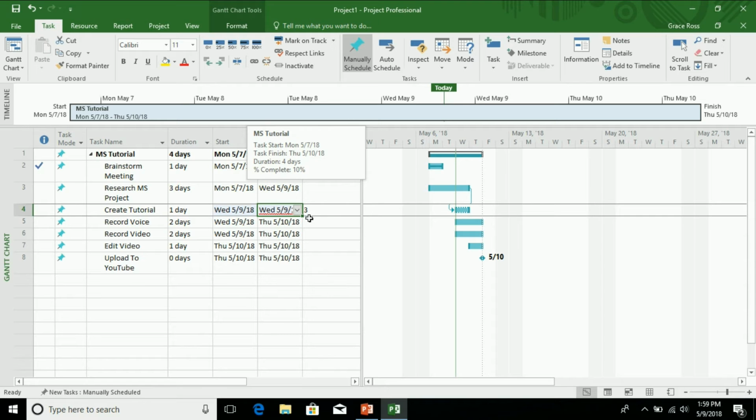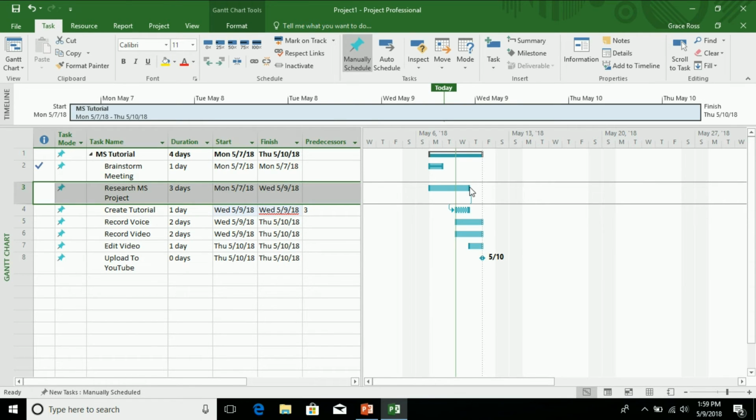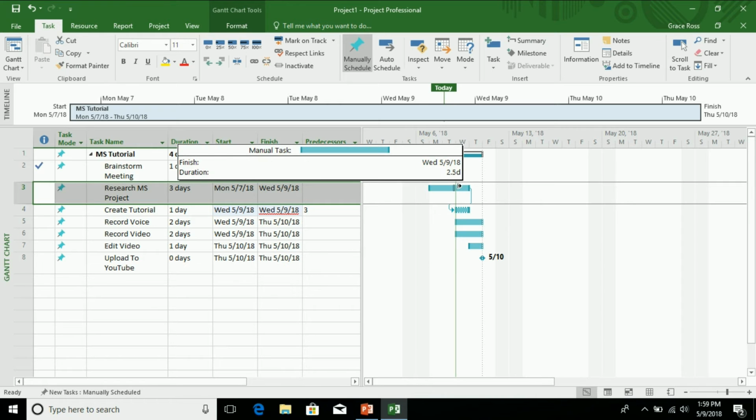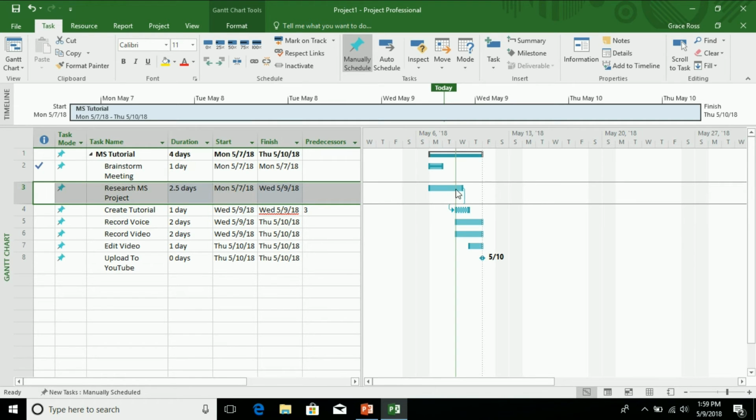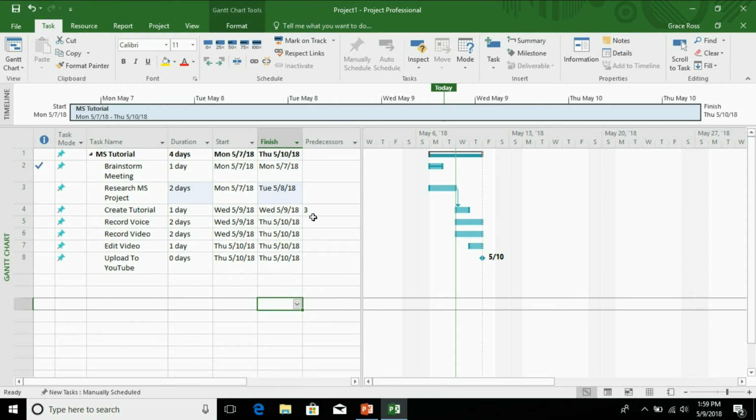Here we see another scheduling issue. You can leave it, but I will fix it. The arrow shows that this is a finish to start link. If you hit respect link, the program will fix any scheduling issues. You can change the order on the predecessors in the links windows accessed through the scheduling group. Next, we will be adding a resource. Grace will go over this.